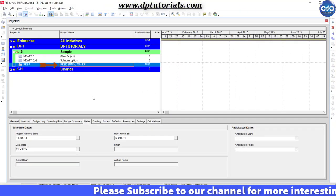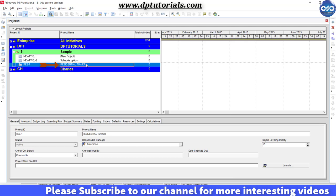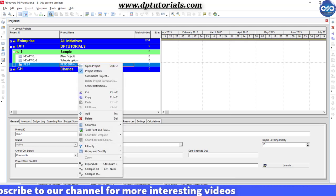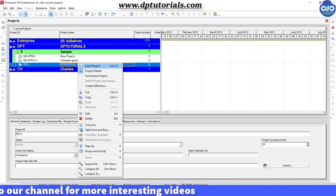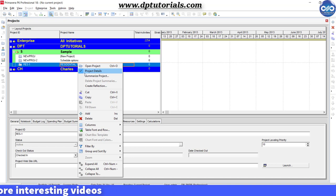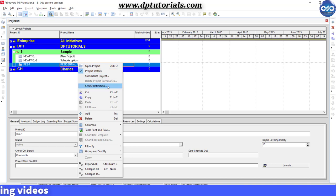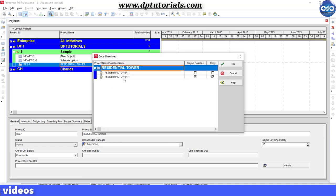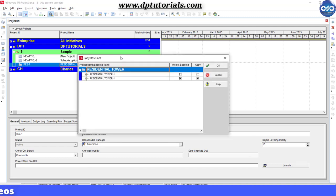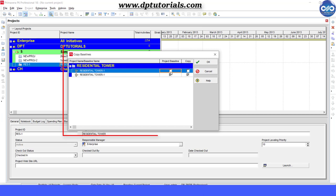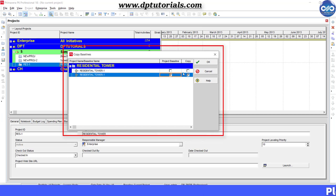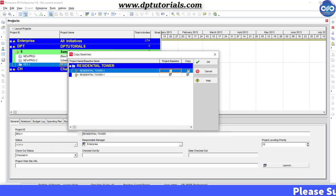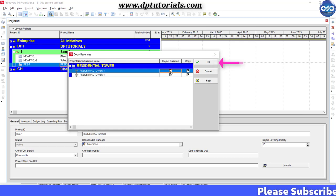Let's consider a sample project which you wish to create a reflection. Select the project and right-click to select create reflection. If the project is having a baseline, then you will get a dialog box to select which baseline to be copied. Select and then click on OK.